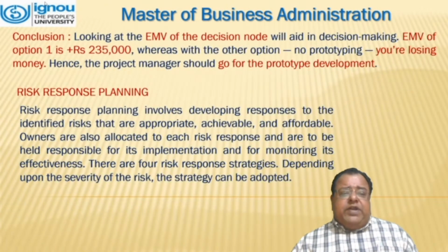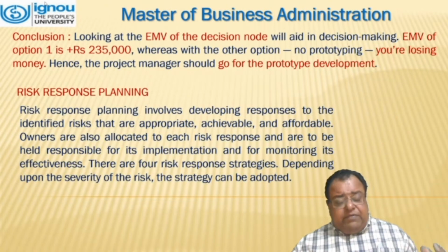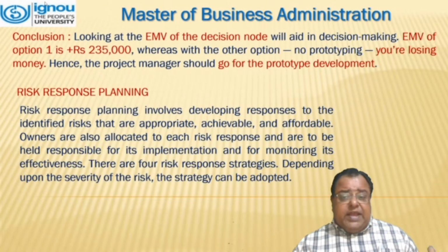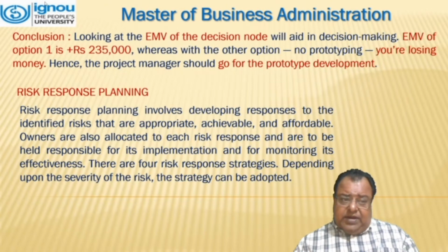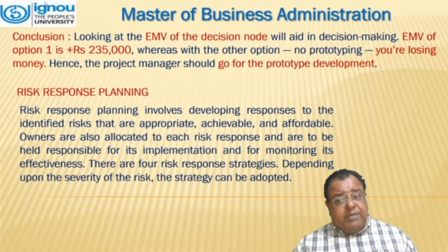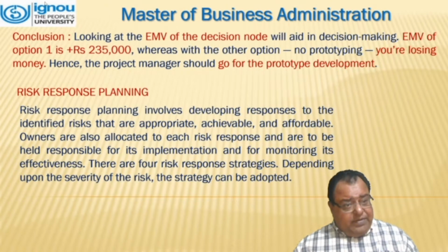So what conclusion do we draw? Looking at the EMV of the decision node to aid in decision making, the EMV of option 1 is plus 2,35,000 rupees, whereas with the other option, no prototyping, you are losing money. Hence, the project manager should go for the prototype development.